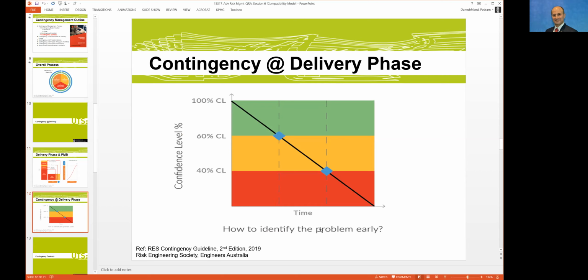When it comes to assessing the confidence level, this is the other element that the new risk-based project controls is trying to measure regularly. My personal recommendation is that on a quarterly basis, in addition to the traditional project controls like having the cost report, having the schedule, checking the actuals, checking the change orders, variation orders, and so on, it's important to assess and measure the confidence level.